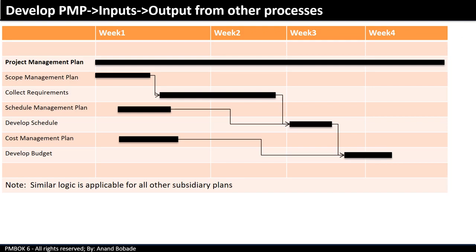Let's take a further example to understand how to prepare project management plan and at what stages all these subsidiary plans will act as an input. Imagine you are working on a project, you have been given the project charter and you have to start planning. So the next step is to create the project management plan. But the problem is, where do we start? So I prepare a schedule to complete all planning activities in 4 weeks. I will start working on the project management plan by documenting project approach, project phases, phase-wise deliverables, etc.